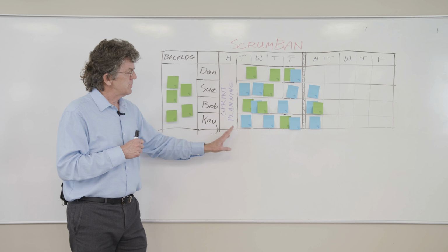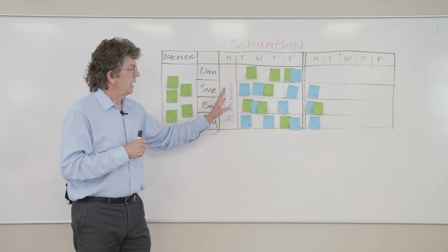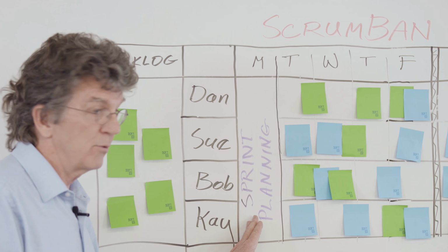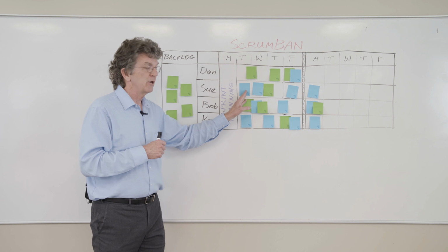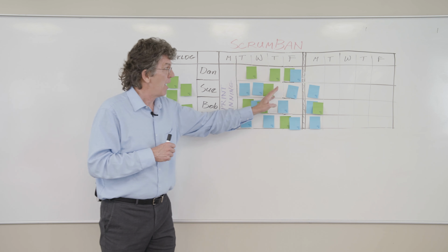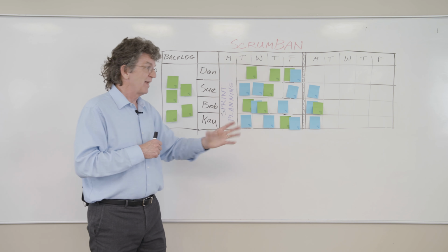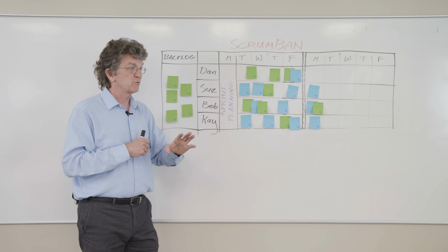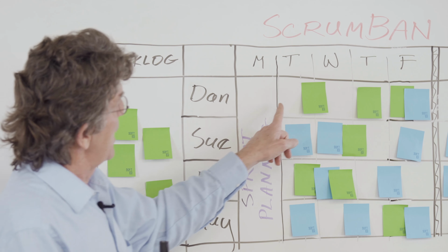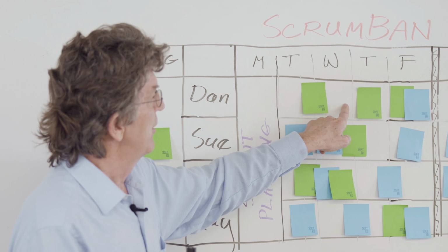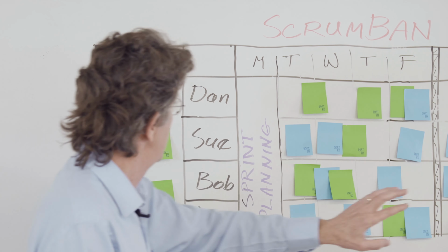that are going to be assigned to the members of the team. What this represents is taking the individual work tasks, estimating roughly how long we think it'll take to complete each task, and then mapping those time boxes out over the 2-week schedule, allowing about 6 hours a day of actually productive task work to get completed. So Dan has got a big task that's going to take him a couple of days, and then a smaller task, and then 2 small tasks he'll get done on Friday.